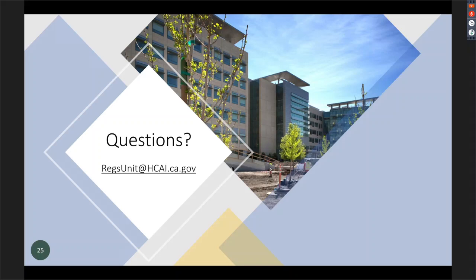When you submit an NMA for concurrence, include the form. Our staff will either initial and date the form, or they'll stamp and sign it in some way, put a concurrence stamp on it, and return that to you. That's your evidence that the NMA has been concurred with. Now you can update your log accordingly to show the date and who signed it. So hopefully that's clear now.